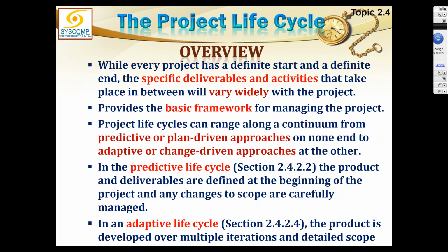When you are sure about the scope of your project, say I have to construct a school or a house and you know how many rooms are going to be there, the requirements are absolutely clear, or somewhat clear, then the product and deliverables are defined at the beginning of the project. Although there might be changes, any changes to the scope will be very carefully managed. There will not be many changes, there will be controlled changes.